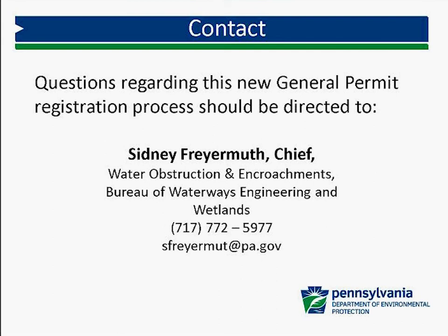If the fee is not submitted, is the permit denied or withdrawn? If the fee is not submitted with the general permit registration, you will receive a notice that it is incomplete. Let me elaborate on that. On the GP registration form, under Section G, Decision Review, whoever's reviewing the permit will sign as the reviewer the disposition status of your GP authorization.